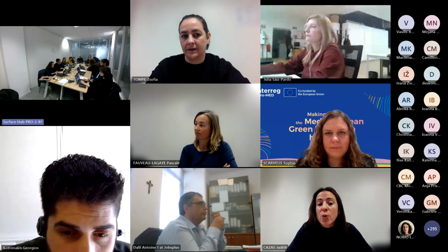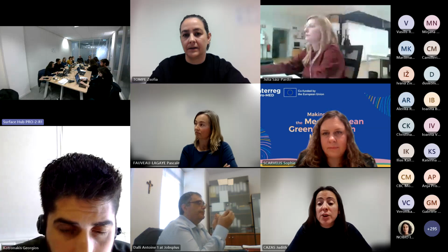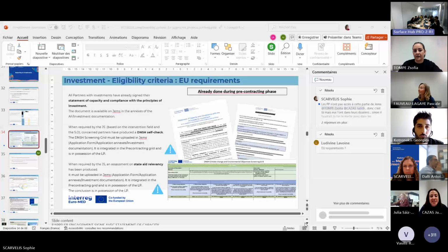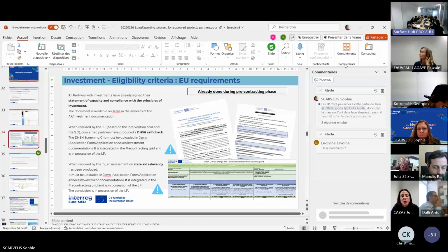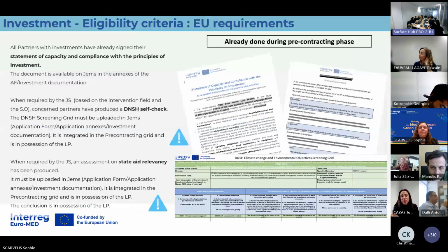But you may also have equipment not linked to an investment, for which you will have to declare, to make depreciation rule indeed. So when you declare, for instance, the easy example is probably a computer, laptop, you will declare the depreciated amount for the period. So basically, in the total invoice value, you will put the full price of the computer, no? And in the declared amount, the depreciated amount.